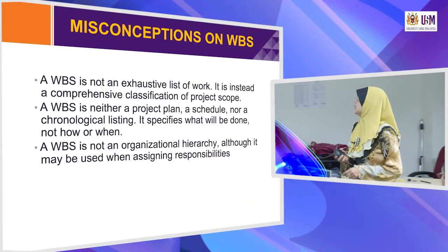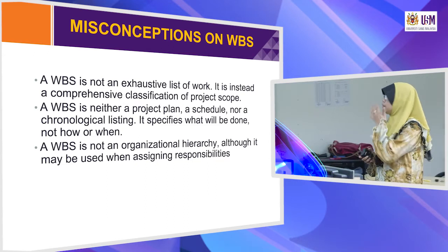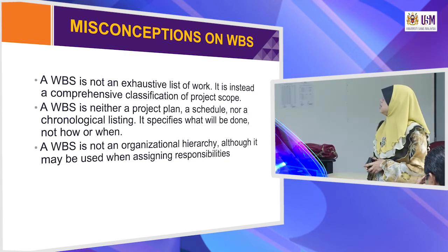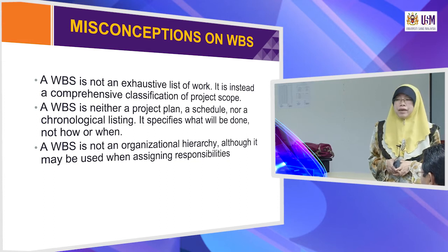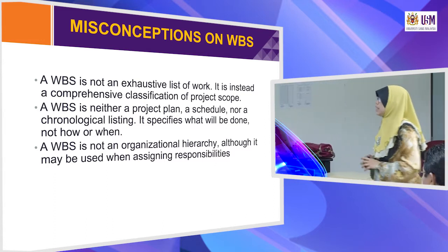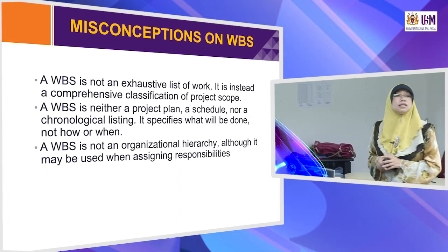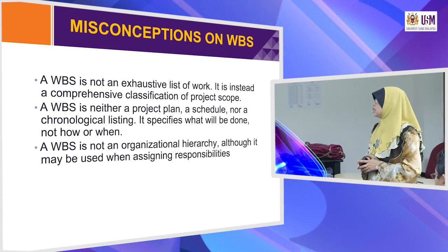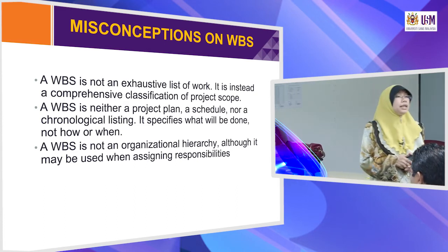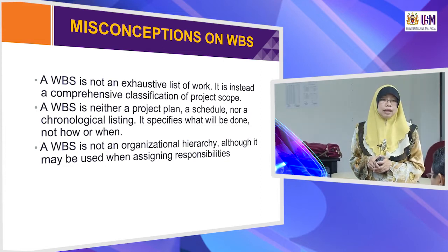So lastly, misconceptions of WBS. WBS is not an exhaustive list of work. It is instead a comprehensive classification of project scope. We just classify packages, what we have to do one by one. A WBS is neither a project plan. It is not a schedule, nor a chronological listing. It only specifies what will be done, and not how or when. What to be done.